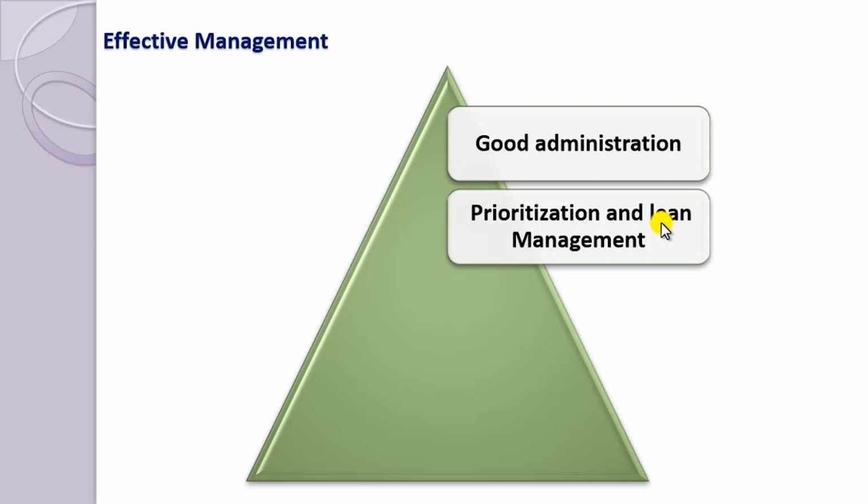Prioritization is something which every project manager should work on. Whether it is planning, whether you're fixing the issues, or when you're delegating the task, it's very important. And when you're talking to the customer, especially in an IT project, a support project, the customer comes with n number of issues and says this is priority, because sometimes they are not aware, sometimes they want to get things done in a fast manner. But as a vendor project manager, it is your duty to check those issue lists, check whether it is feasible in that time limit, and ask the client to mark the priority.